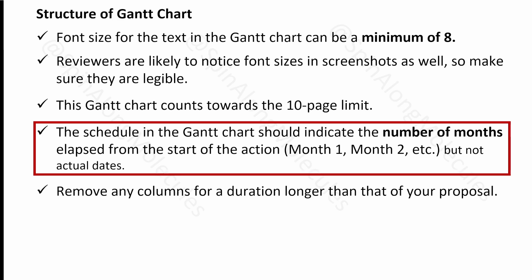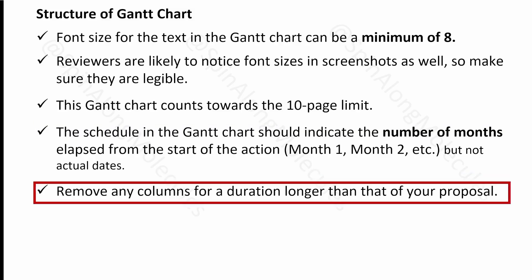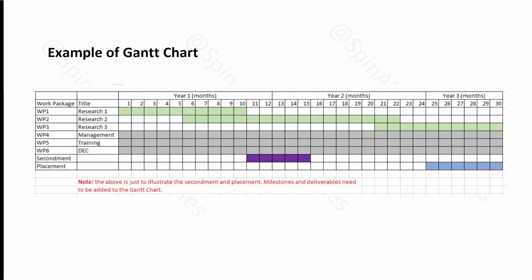The schedule of the Gantt chart should indicate the number of months from the start, like Month 1, Month 2, or M1, M2 — don't write actual dates. Also, remove columns for any duration longer than your proposal. For example, if your proposal is for two years, don't include anything beyond that. If you're on a Global Fellowship spending three years, then include three years.